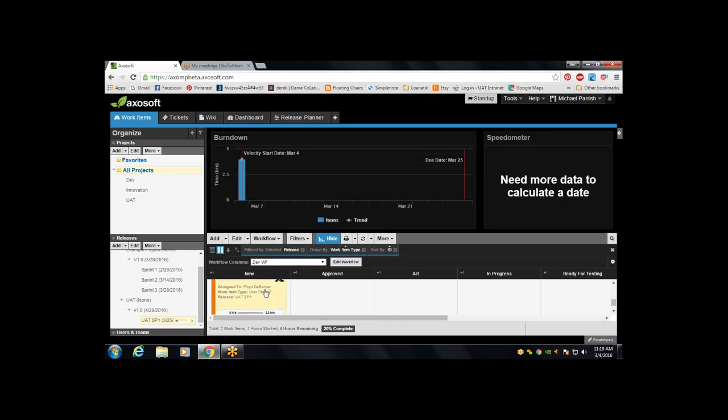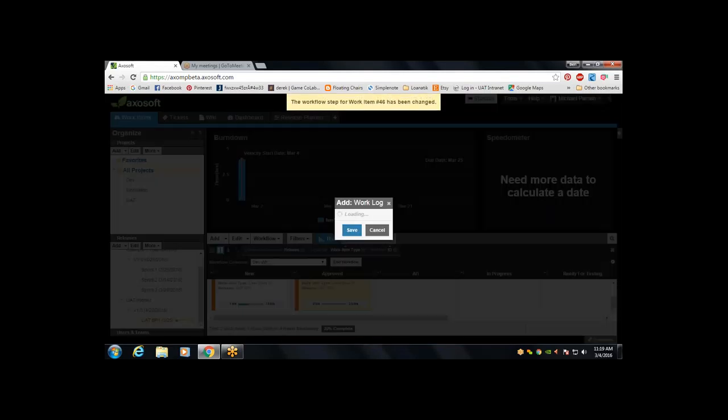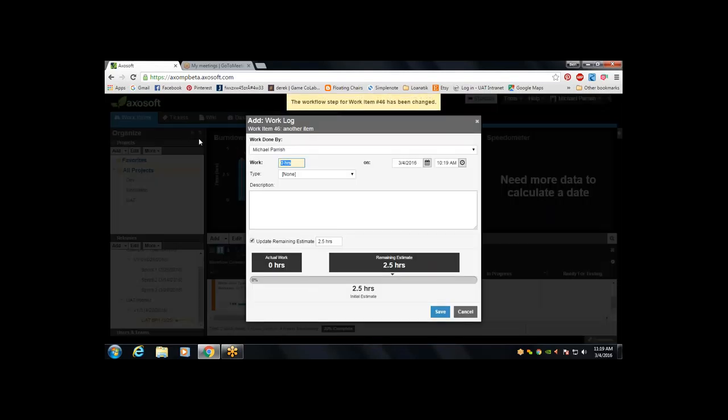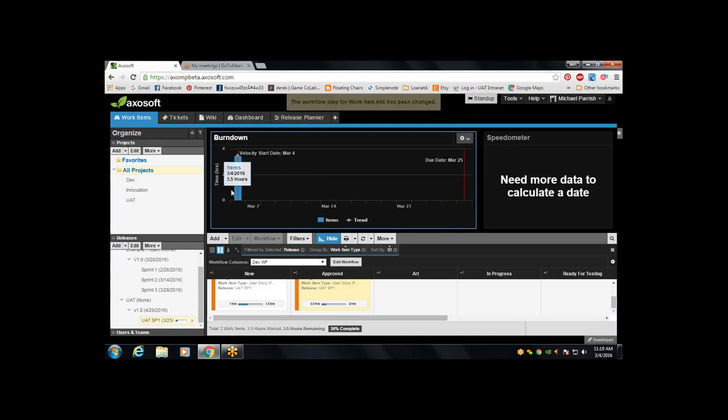So I've got work here, but if I don't do anything and just leave it out, and I start dragging these over, that's not going to do anything to this. So if I move this into approve, that's great. But then I also need to say, what did I do to get it to approve? I must have put in 0.5 hours. I have to commit time to the system, and that's what begins to erode this.